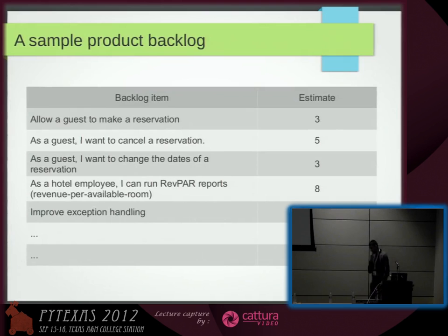But the thing is that people are very bad with doing estimates in absolute values. So 5 or 3 days, that's going to work good. But if you go to the 15 or 17 days, it's worthless. So there are ways how estimates are done. But I just wanted to point out to remember that we're talking about relative things.